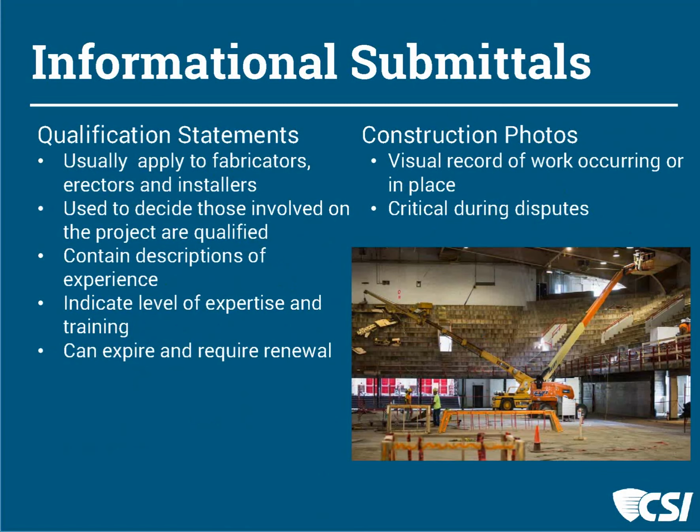We may require in our specifications that there's some record that the contractor keep being there every day. These can be critical to dispute resolution, but that's a visual record that we may assign responsibility to the constructor to keep. So that's a quick pass through